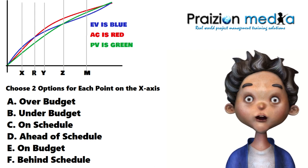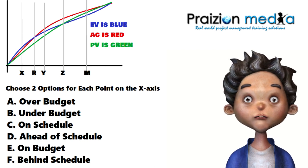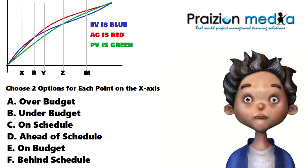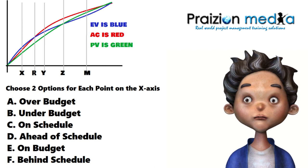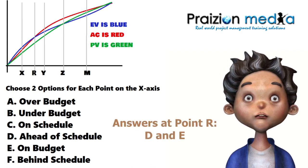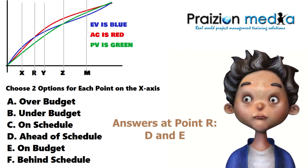Let's go to our next point, point R. At point R, earned value and actual cost are aligned, which means earned value is equal to actual cost. So the CPI is 1 and the cost variance is 0. In terms of the schedule, the earned value is above the planned value line, so that means you're getting more done within the time period. For that reason, we can say at point R, you are on budget and you are ahead of schedule — option D.